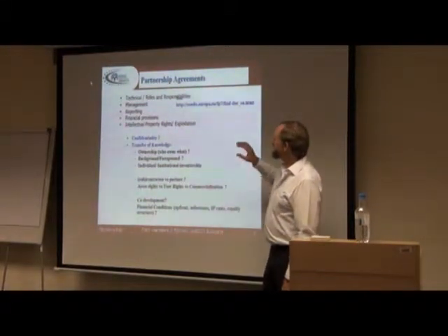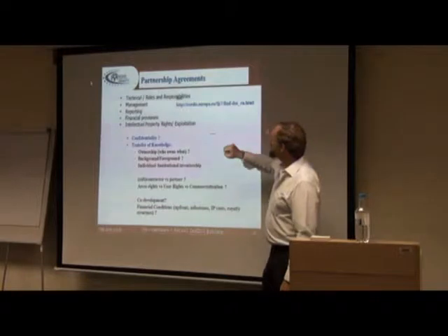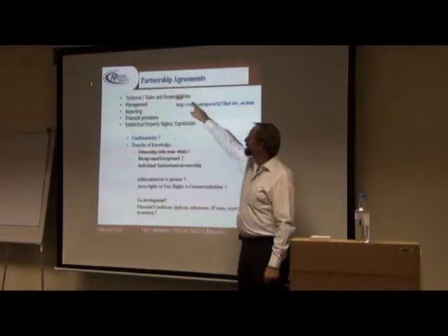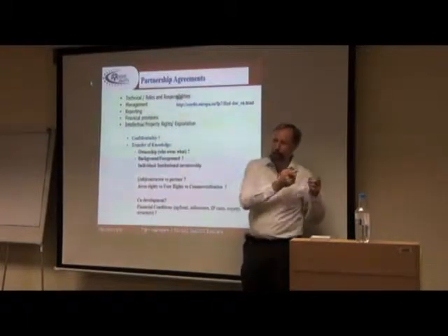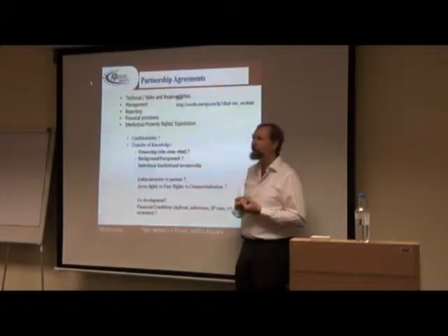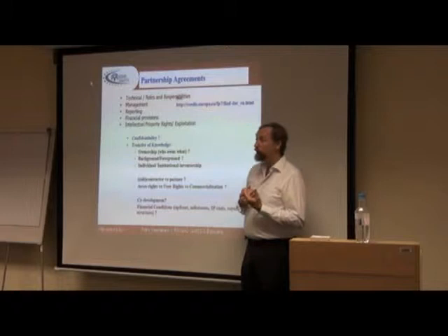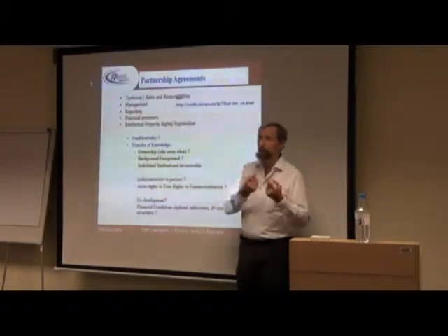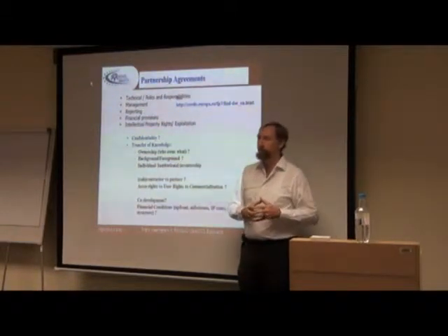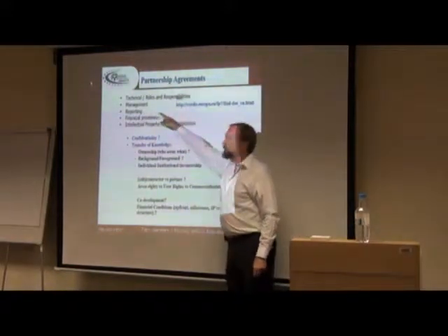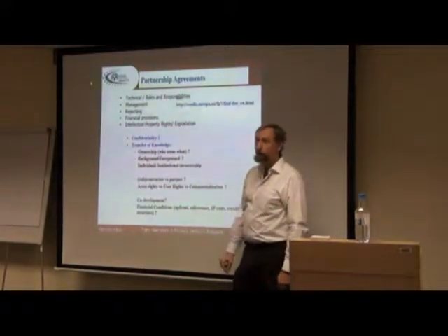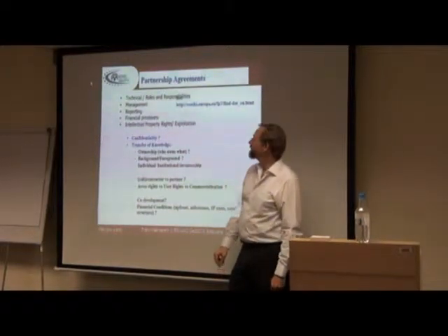But what you can find in these partnership agreements are usually the technical roles and responsibilities. Are you a subcontractor? Are you a main partner? Are you a work package leader? Which work packages are you responsible for and which are you not involved in? And that relates to ownership. Who is in the management? Are you part of that management or not?